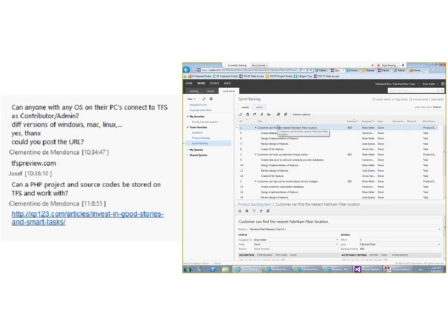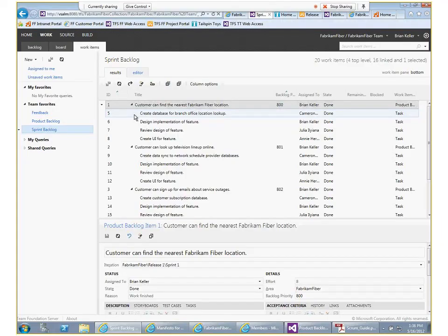So now you can see how, by being able to create PBIs or requirements and by being able to prioritize them, I'm able to fulfill those qualities that every requirement has to have, right? And that's the main thing that you have to understand when looking at the artifacts that Scrum asks you to work with. When you think of an increment, that increment has to be self-contained. And it's got to be tied to a build, and that build has to be working software that the customer can then go and evaluate at the end of the iteration.